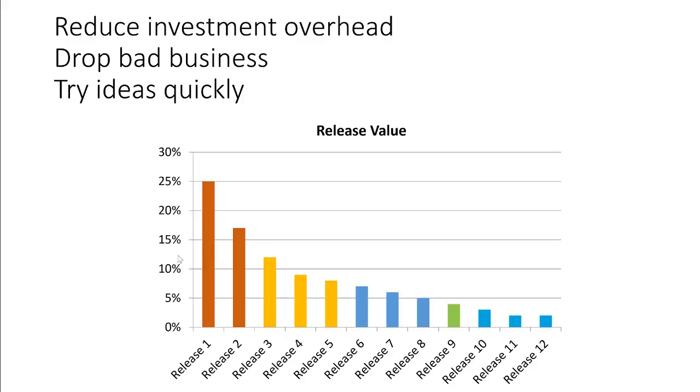Now you can look at that and see you are reducing your investment overhead, because it can mean a couple of different things. One, your investment risk is limited to each release. So if I got through this release and things bombed, the only risk that I've had for the entire capital for the project is that release. You can reduce the overhead too by planning and placing an investment cap or an ROI cap on it.